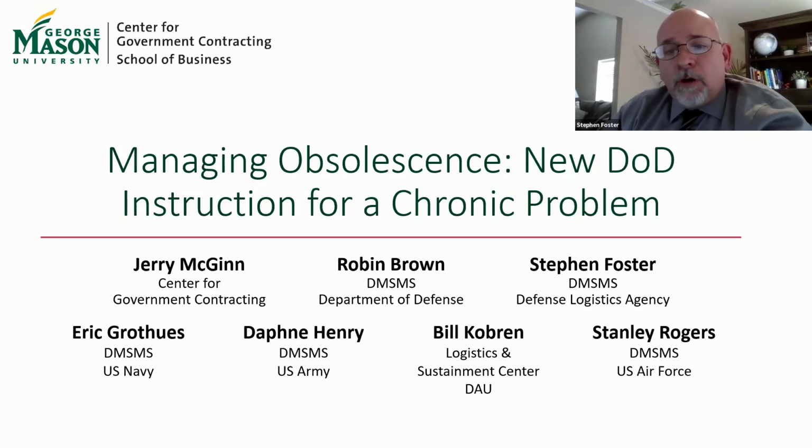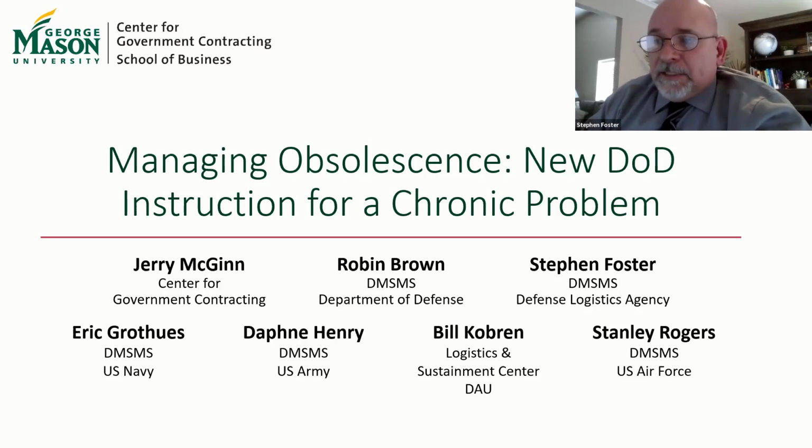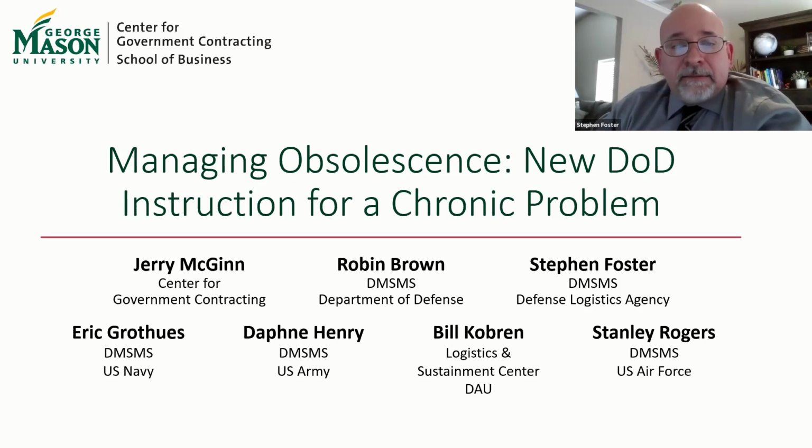Surprisingly, there are a lot of small companies out there that make extremely critical items for major weapon systems. We put together a report recently, citing some of the examples that have given us cause for concern, because they were last minute buys that we had to present that were all more than $250,000. And we really had less than 30 days to evaluate it, to coordinate among the services, and then to try to generate a PR to stock these parts to be able to take care of those weapon systems.